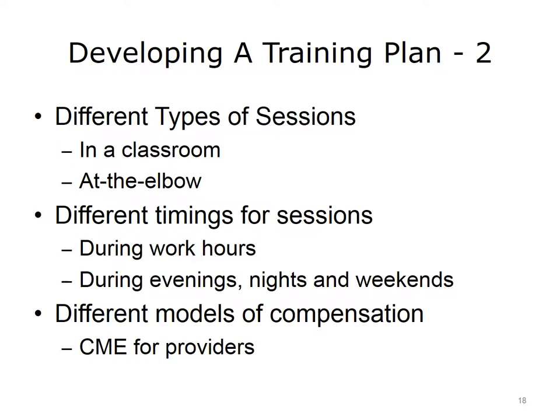Managers of the training program will need to determine what types of learning groups will be needed. Some training can occur in large groups in a classroom setting, while other types may require individualized or one-on-one training. During business hours, it can be difficult to conduct EHR training for clinicians delivering care to patients; therefore, individualized classroom sessions may need to be scheduled. Some clinicians may prefer at-the-elbow training in the clinical environment while continuing to care for patients. Trainers must be creative when scheduling training, for example during periods when patients are not seen or during evenings and weekends.